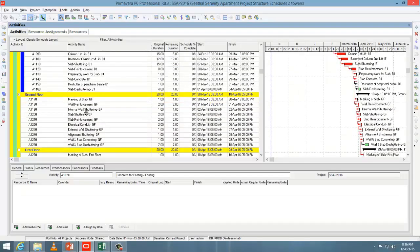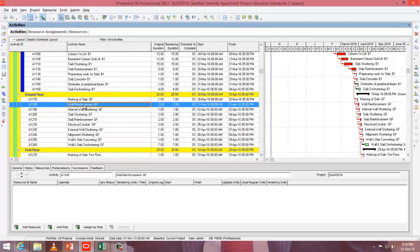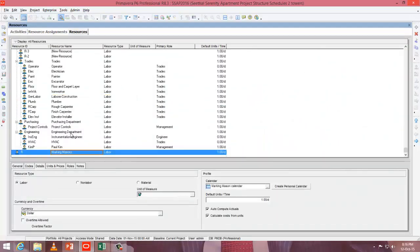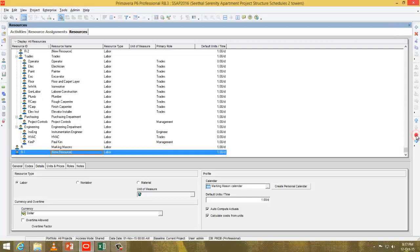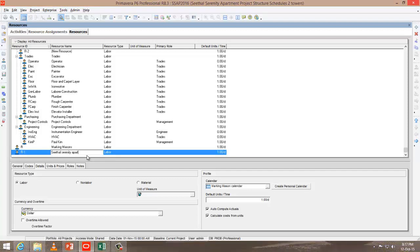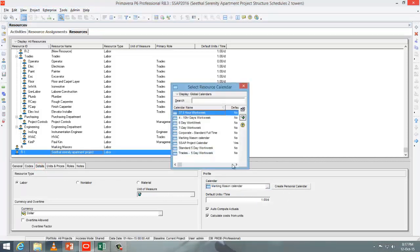Look at this example. To create a new resource, you have to click the resource button. It will go to a window where you can see all the resources in the project. To create a new resource, press add and press the move button and make it on the left side. Name it as your project name because the first resource you have to give the project name — it's a dummy resource. We are creating this resource only to assign the calendar, so that every resource created under this will follow the calendar. Go to details and check the calendar. Here it's following a different calendar — change it to our project calendar as SAP project calendar. So this is why we create a dummy resource.